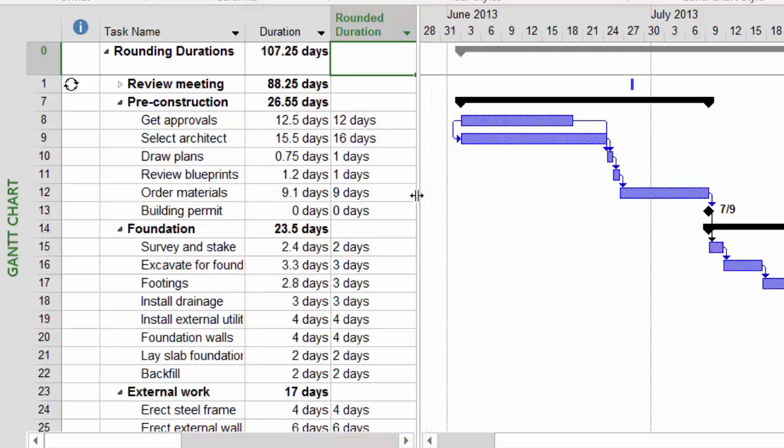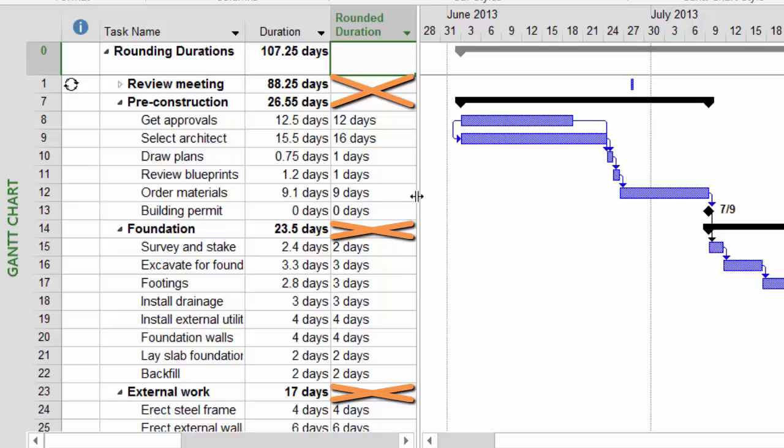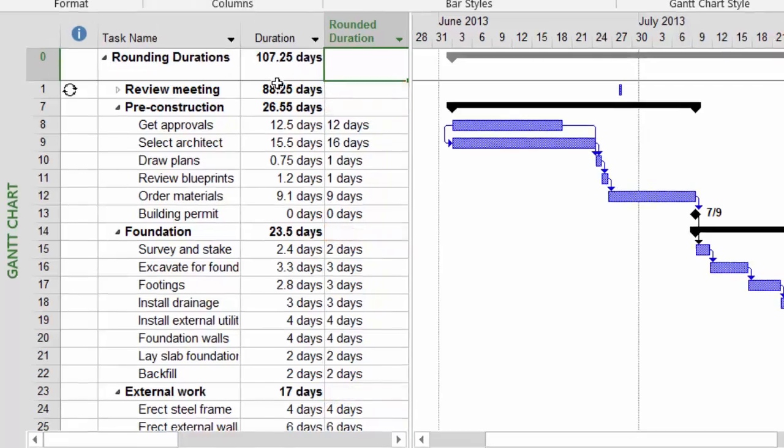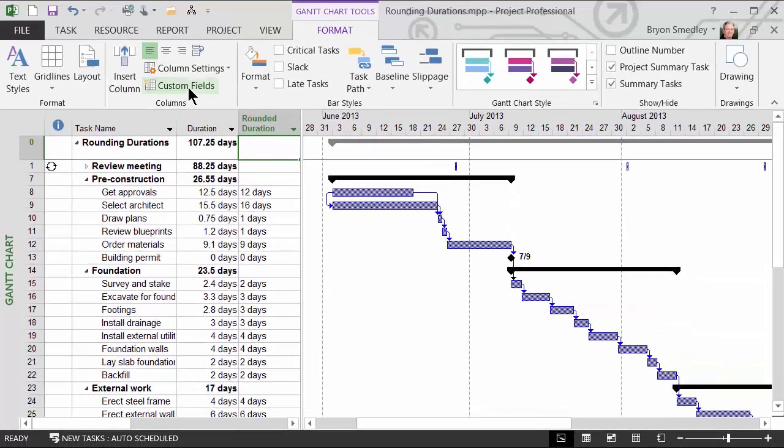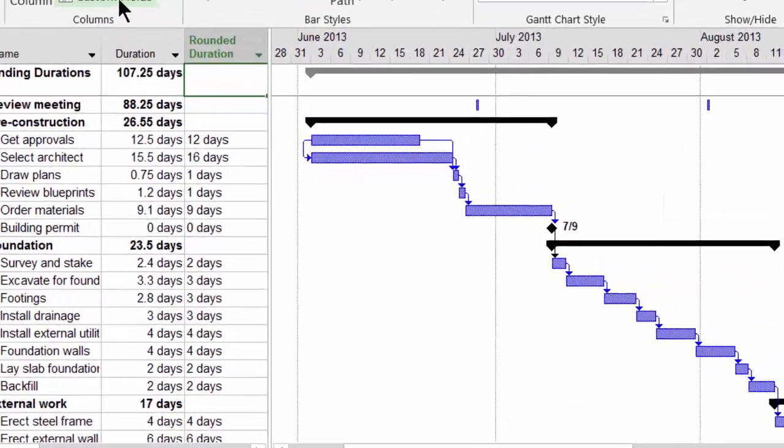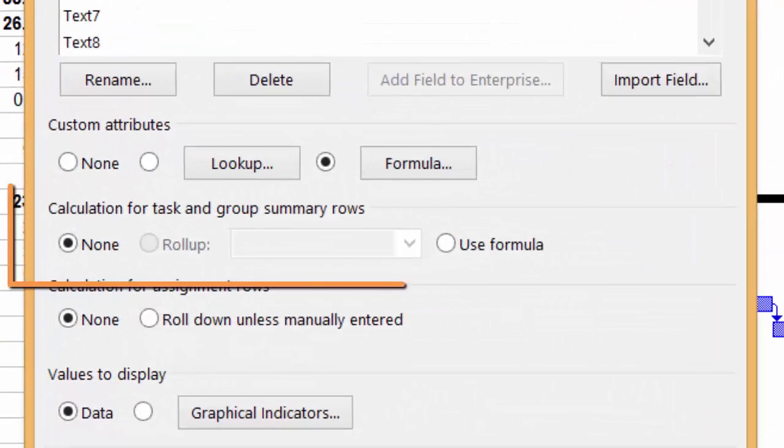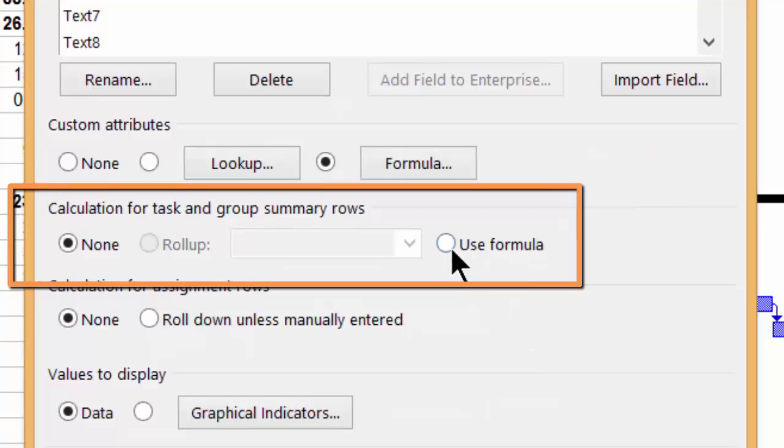What you'll also notice is that the rounding did not carry over to my summary tasks. The reason for this, if we go back to Custom Fields, is there's an option here called Calculation for Task and Group Summary Rows.